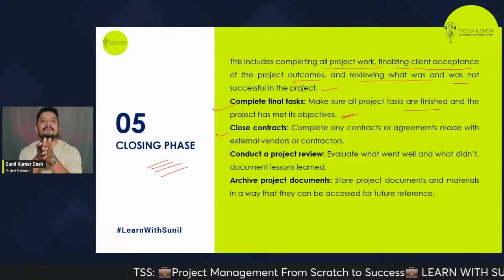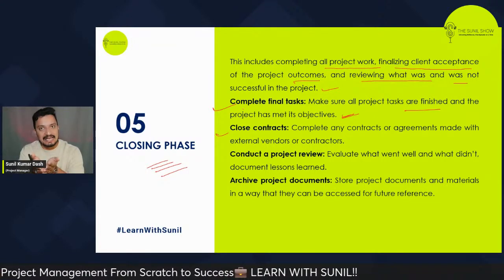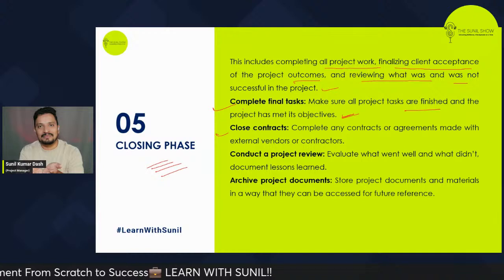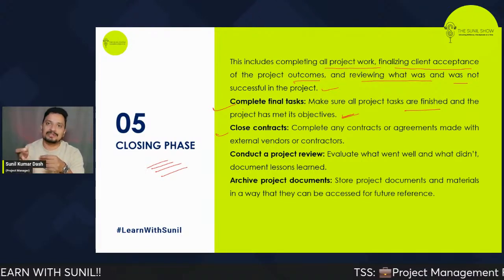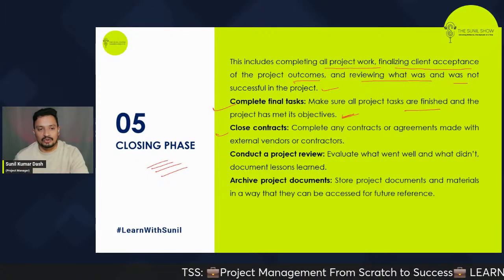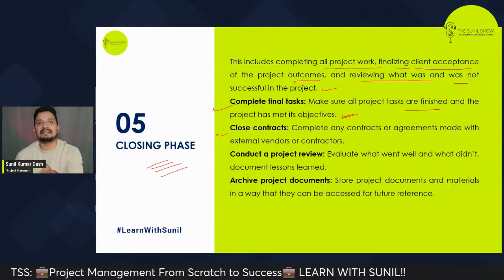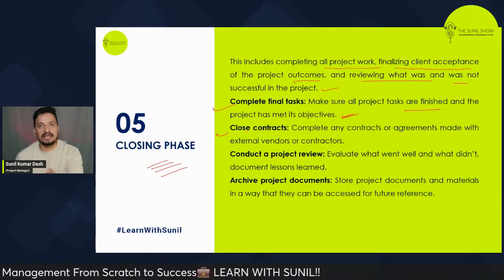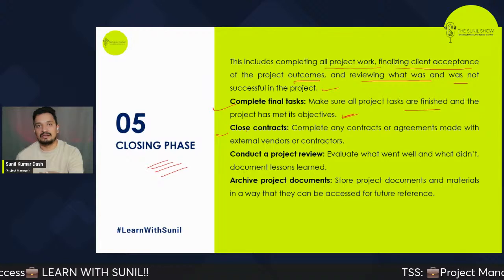Then close contracts. So formally, the way you have initiated the project through the business case or the project charter, similarly, now you have to put an end to the project or close the project through formal closing documents, project closure documents. If you have acquired any vendor, you have to end the contract formally and smoothly. You have hired a freelancer to work for you, you have to give a closure to that, right?